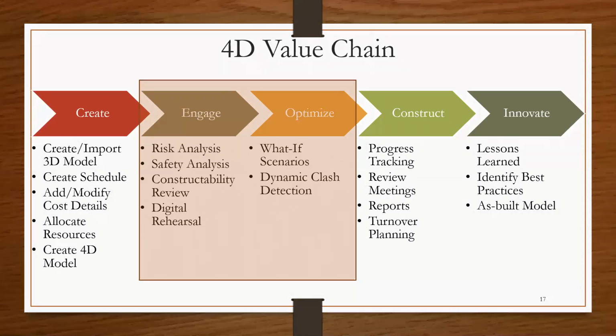The next thing you do is you begin to do scenario analysis. What ifs? For example, instead of fabricating your pipe racks in place, what does this do to our schedule if they are fabricated off-site and loaded in? Some of these analyses you can begin to do very, very early in your project life cycle to gain value and improve your project outcome.